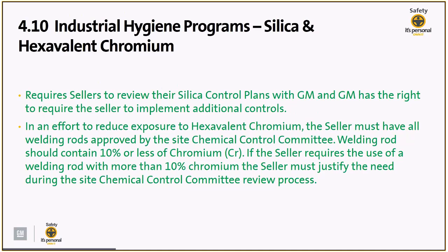4.10, industrial hygiene programs. We do have two statements in there that are above OSHA regulations. We require the sellers to review their silica control plans with GM, and that GM has the right to require the seller to implement additional controls.